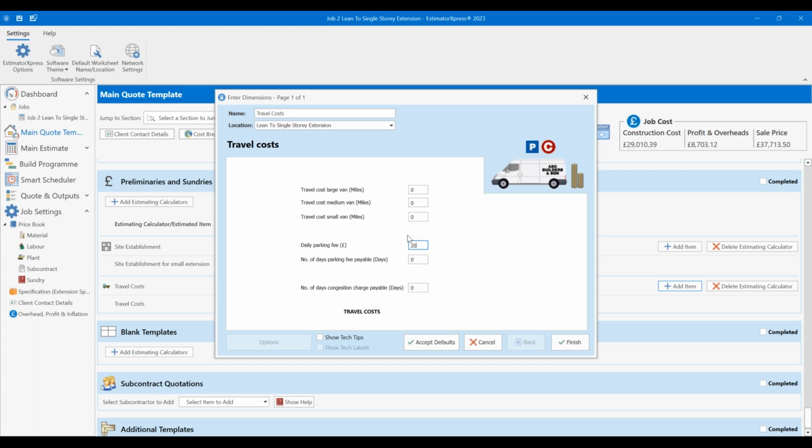Good example, South Bristol, we have resident parking permits. People in their area pay so much per year for the privilege of parking their car outside of their own home, or at least within the local area, and they get so many days of parking for guests per year. They're not so inclined to use all their guest parking allocation for the builders to get work done. So they are fully aware and understand that if they want builders in to do work for them, those builders will have to get permits, and that will be costs allocated towards the job.